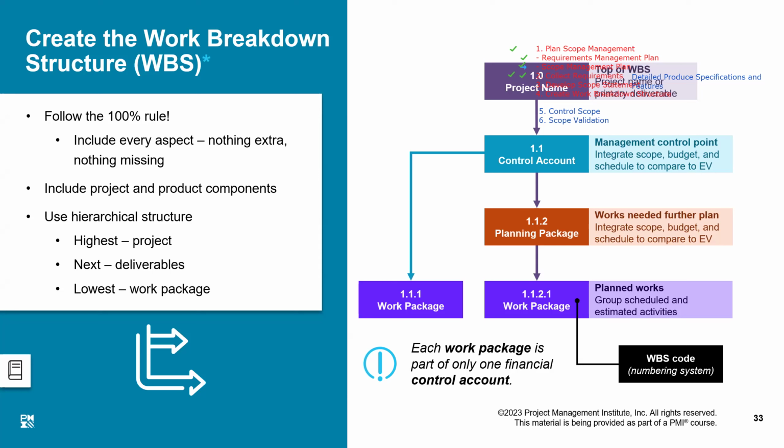Because that data is not available right now, I will consider that room as a black box, and that is my planning package. I cannot break it down into further details, so I will just call it a planning package. I will complete all other work packages. I will even start the construction, but the planning will remain pending for the planning package until that data becomes available. And once that data is available, I can break it down into further work packages.